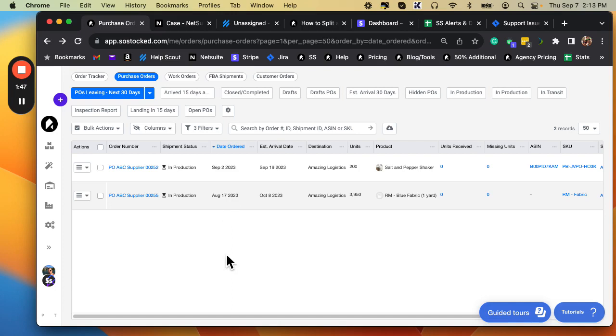Now, why would we want to have this dashboard? Well, this is so that we can follow up with our suppliers. So if I can run this report, let's say at the beginning of every month, and I go, I've got two POs that are supposed to be leaving production in the next 30 days.